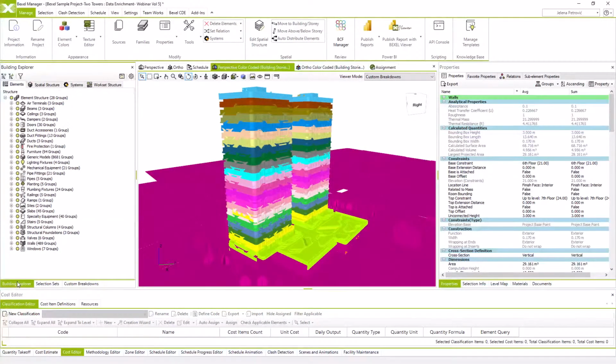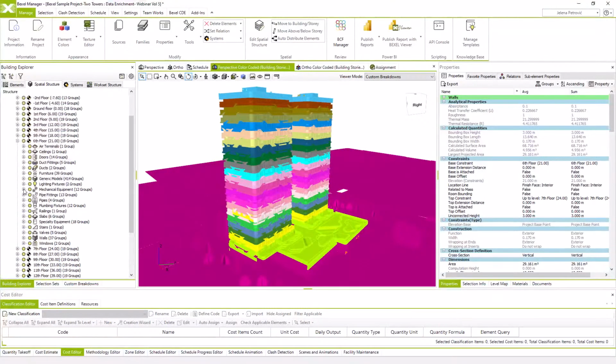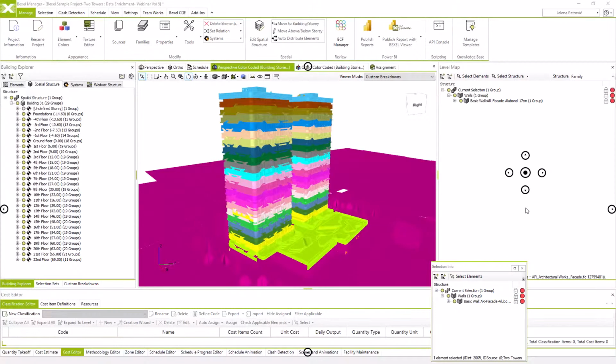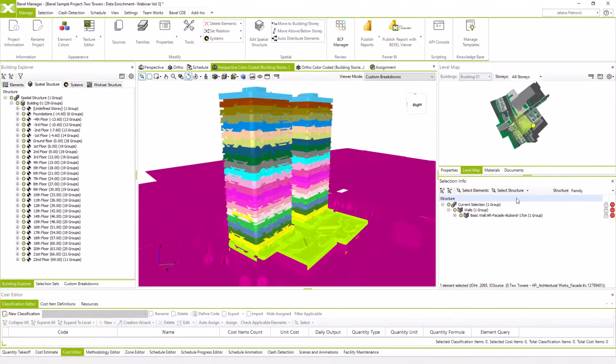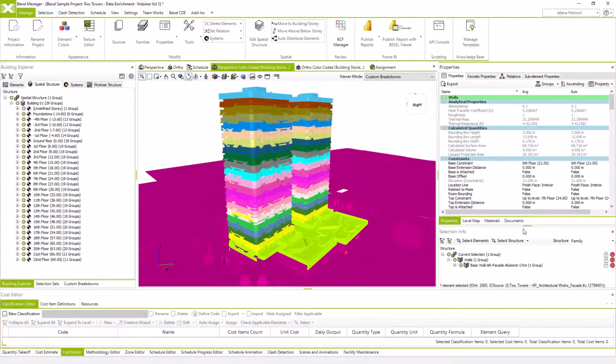When we talk about the data enrichment process that should satisfy further BIM model analysis and creation of a 4D, 5D BIM model, I want to mark that classification codes should be mandatory for a BIM model. It doesn't mean that we cannot work without them, but the process of optimization for achieving a 4D, 5D BIM model is much more comfortable if we have these attributes within the BIM model. And in the first place, we can make this process faster.